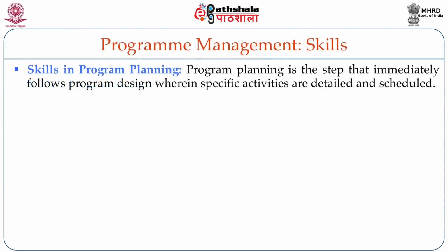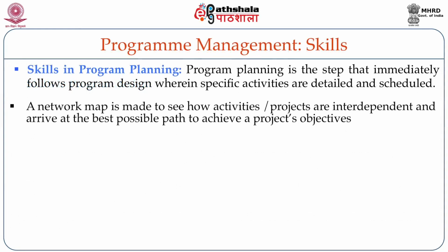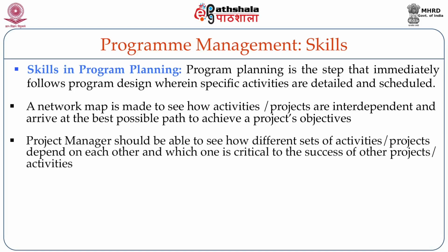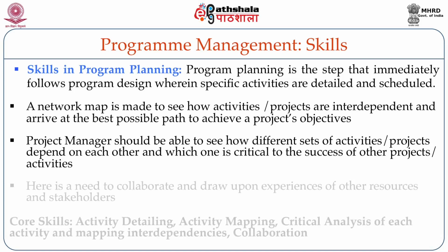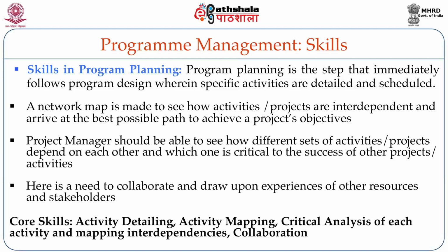What are the skills in program planning? A network map is made to see how activities and projects are interdependent and arrive at the best possible path to achieve a project's objectives. The project manager should be able to see how different sets of activities and projects depend on each other and which one is critical to the success of the other projects. So there is a need to collaborate and draw upon the experiences of the stakeholders of the other projects. So what are the core skills required?